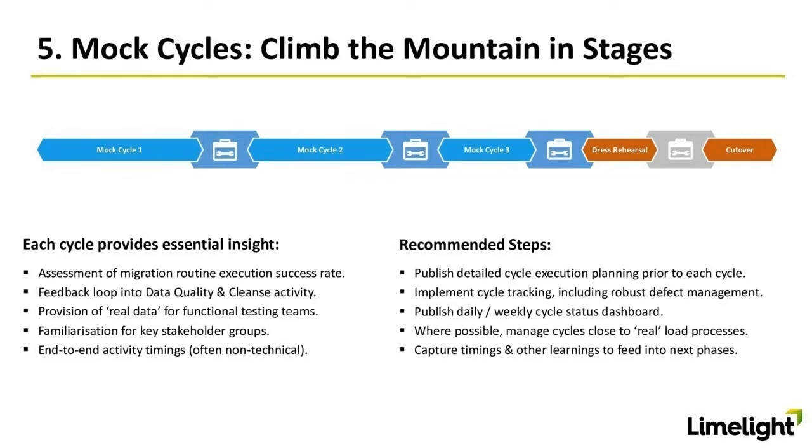It's important to see each mock cycle as a chance to bring real information into that. Each of these cycles is also providing data, effectively real data, that functional testing teams can use. And so that's why in some of the diagrams you've seen Brian present, these cycles are feeding test windows, and that's pretty important. And that's the case throughout the cycle window. We should be keeping that in mind.